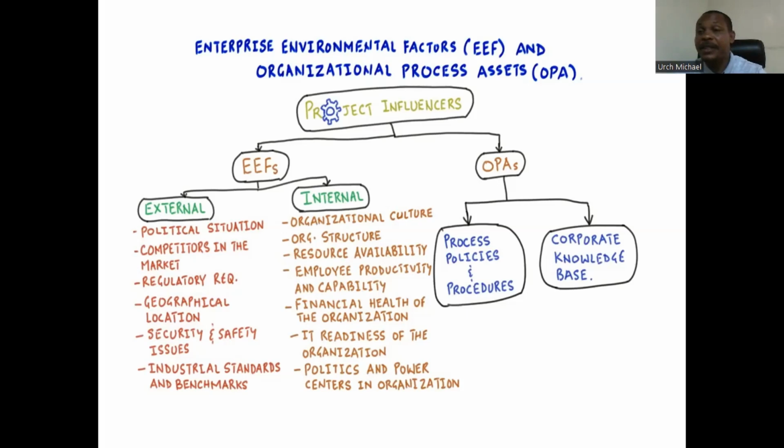Okay, and then we have internal EEFs that are internal to the organization. We have organizational culture, we have organizational structure, like we already explained. The culture and the structure of the organization have a way of affecting the project, and also resource availability. If you have a project and you don't have enough resources, like human resources or material resources for that project, it's going to affect your project. So you're going to look at that.